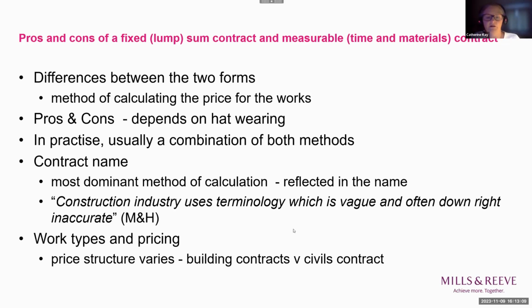On civil projects, we usually see that they carry a greater risk than traditional projects in terms of as-built quantities, which are much more difficult to predict. There can be difficulties with testing due to the sheer volumes. And for that reason, quantities can often particularly be only provisional.